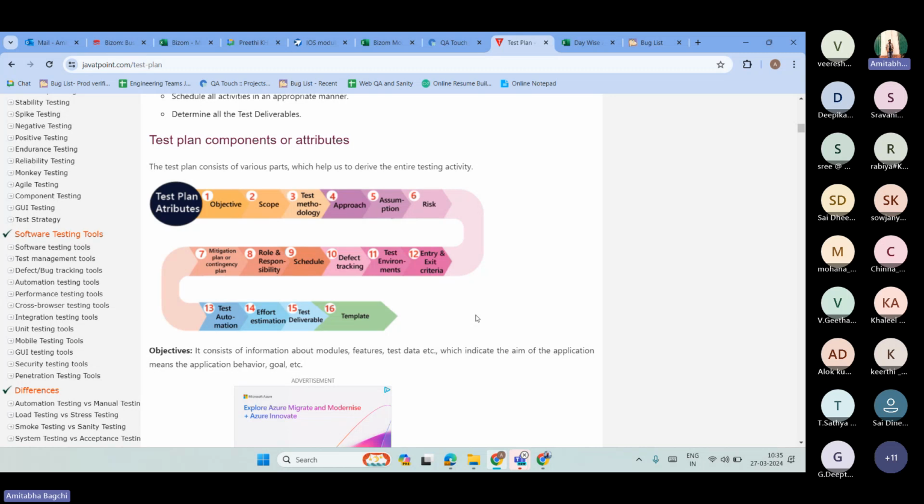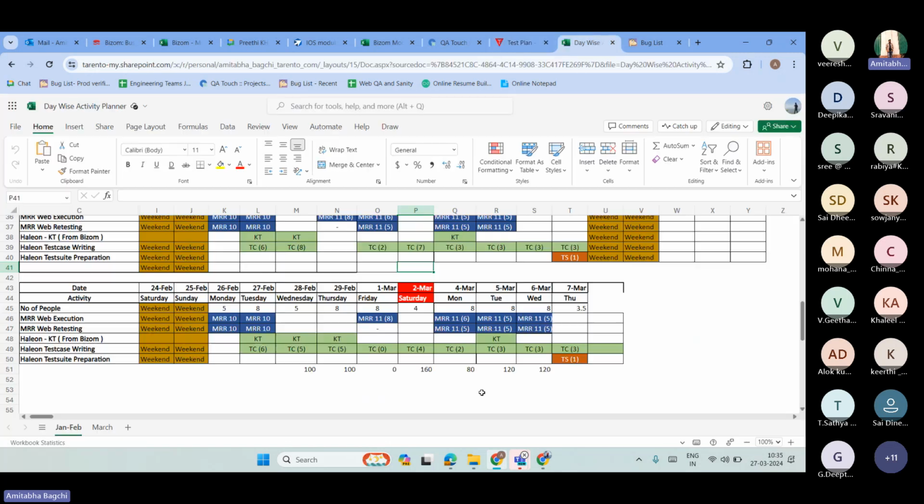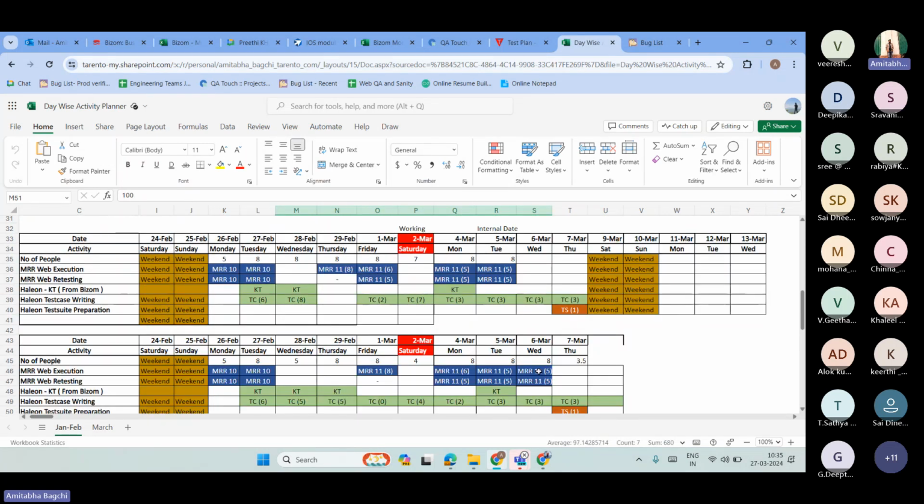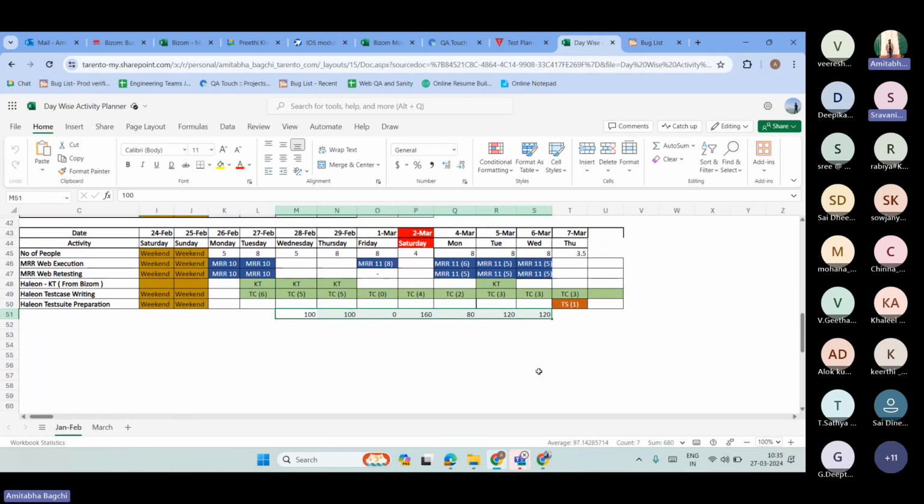Okay. Now effort estimation. As I said, effort estimation is very important because, if you are a lead, you may say, boss, my team will do all these features within 3 days, which is not feasible at all, and it is actually going to take 10 days for your team. You have to consider that. Basically it's a rough estimation. We consider these hours on the basis of an 8-hour working day. So how many resources you have, based on that.